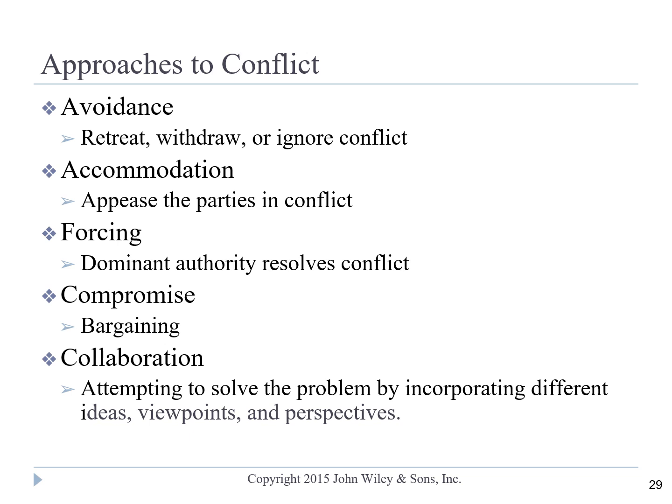This is particularly valid if the power structure is such that we have authority over the other party, and we can force our view on the other side. Typically, if we resolve the conflict that way, it will not last for a long time.